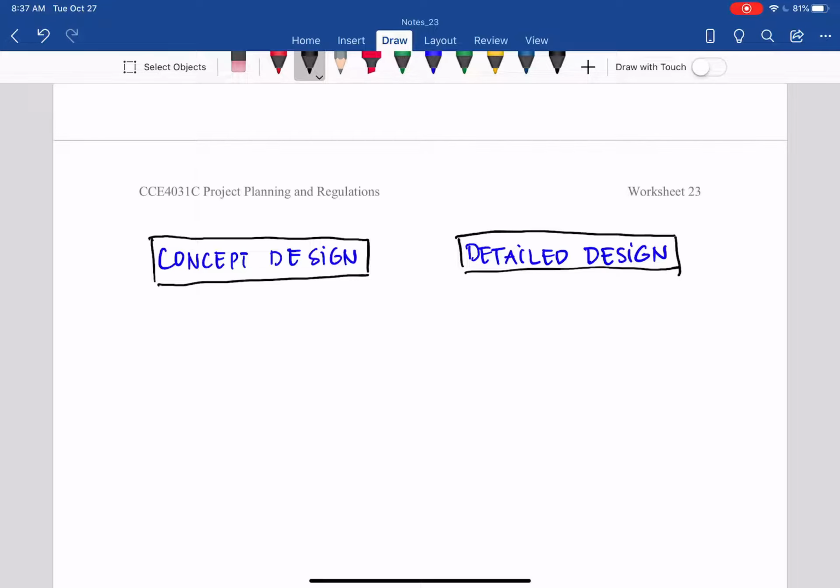As you can see, this one we can model with the finish to start, and it goes from the right side of the predecessor to the left side of the successor activity when we model each activity as one node here. And this relationship, in fact, is the FS, finish to start relationship. It means the predecessor has to be finished before the successor, in this case detail design, can start. That is the finish to start.